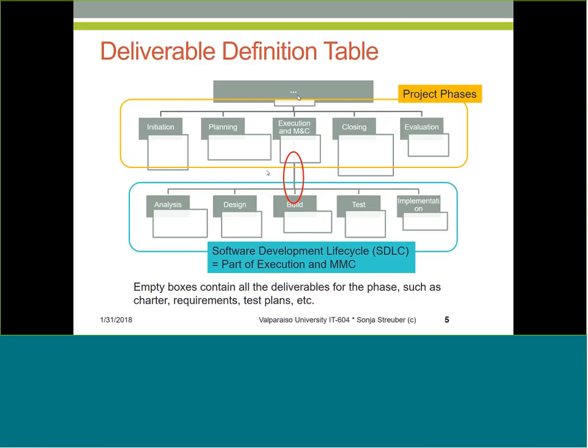Please note that the system we're building as well. And those are the only things that are allowed to be funded, or that are allowed to be completed within the realm of the project charter. Any changes to any scope, it doesn't matter where it comes from, whether it comes from an engineer, from you, or from an outside stakeholder, have to be documented. But they also have to be described. There has to be a justification of why this scope change is needed.